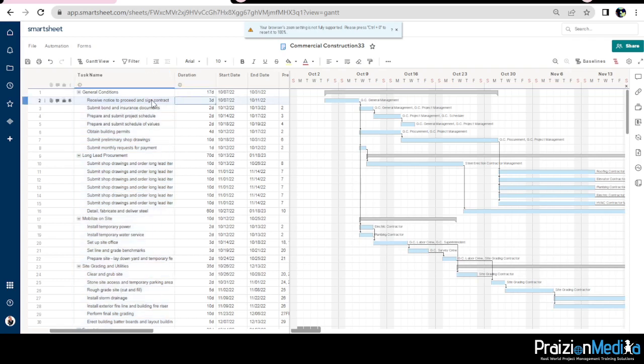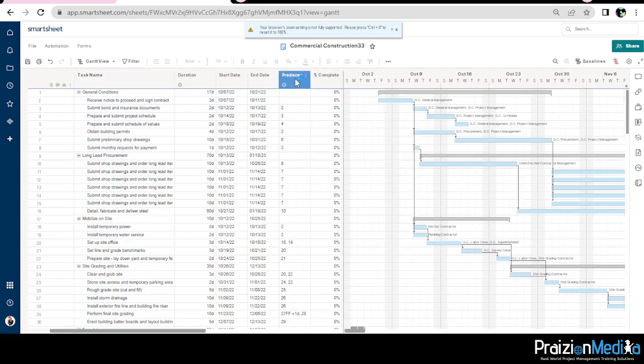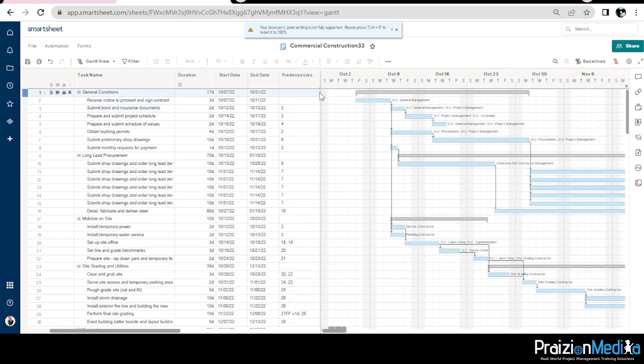When we get the list of activities, we've got to sequence the activities and put them in the logical order of occurrence, and that's where these predecessors come in. And ultimately, you will get to this point where you have a breakdown of all the tasks, and then a breakdown of the start date, the end date, and a fancy Gantt chart to show for it as well. This, my friends, is the level that you need to get to in understanding schedules really well.